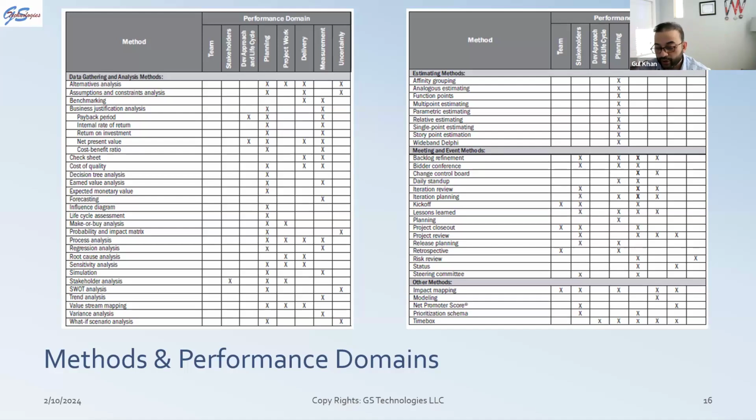I did not go into how many resources are there. I did not go into what is the scope of that one now. I just did a time box on that. This is very high level, but this gives you another high level idea. So I use the time box approach to do a high level planning, and then I go into each one of these phases, and then I do bottom up for each phase. So that's a combination of the two you use. In that way, you will be most effectively doing the project planning.